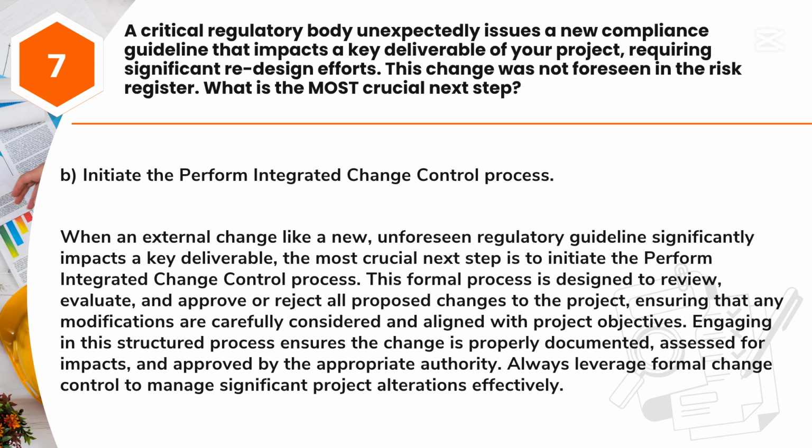Answer: B. Initiate the Perform Integrated Change Control process. When an external change like a new, unforeseen regulatory guideline significantly impacts a key deliverable, the most crucial next step is to initiate the Perform Integrated Change Control process. This formal process is designed to review, evaluate, and approve or reject all proposed changes to the project, ensuring that